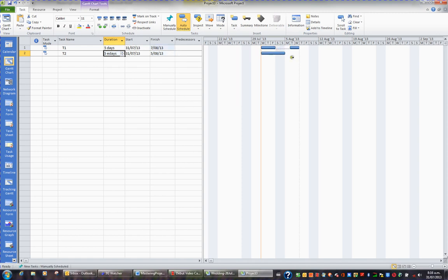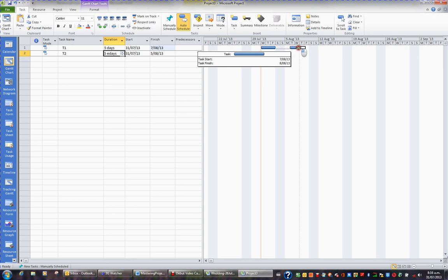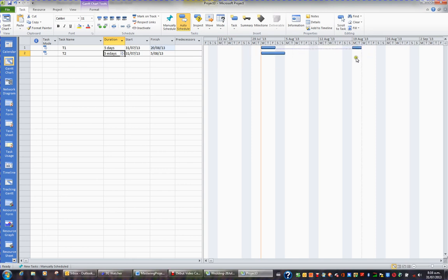I've just broken this task into two. So I'm working Wednesday, Thursday, Friday, and then the other two days, I'm going to drag them across and do those a couple of weeks later, Monday and Tuesday. So this allows me to split my five-day task across a few weeks.